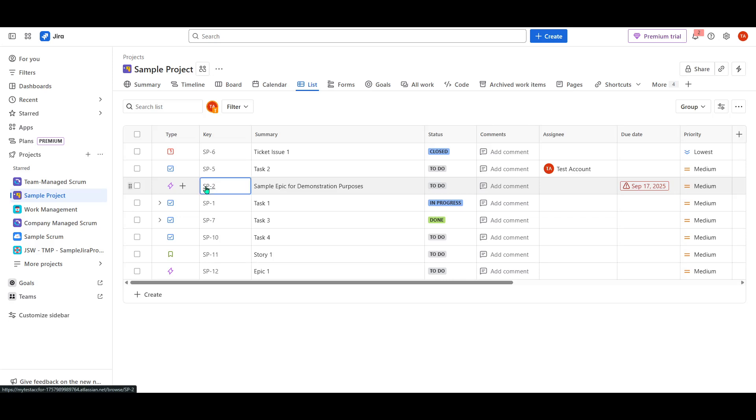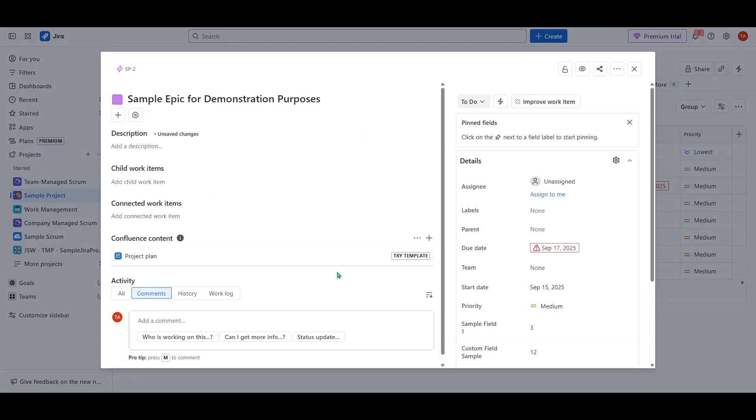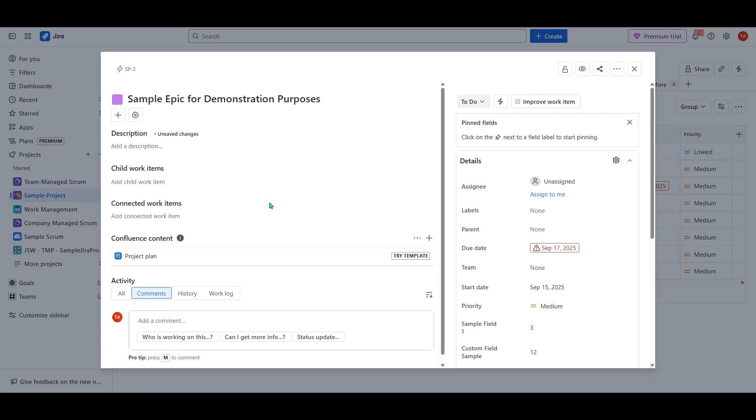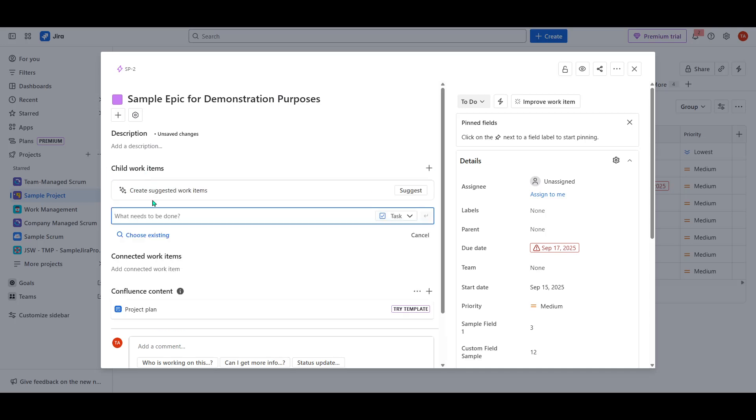With the epoch open, you should see various options to manage and add to your work. Here, you want to look for the option that says Add Child Work Item. Child work items are essentially the stories or tasks that fall under your epoch, allowing you to break down your project into manageable parts and track progress effectively. By clicking this option, you're setting the stage for creating detailed stories that will help guide the development or realization of your project.